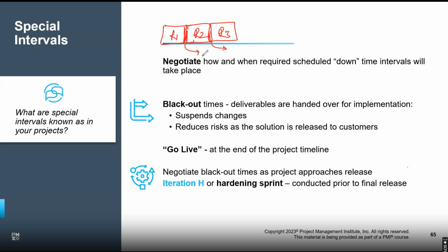These have certain names, so just keep that in mind. The word is blackout. Blackout is when you're doing the release and the handovers are done. When you do the handovers, these are referred to as blackout times. So you do the suspension. You do not do it on a live environment. Nobody does on live. You suspend all the changes which are going on, and active users will be notified that they can't use the application. For that period, you will be releasing this and testing whether it's working. I hope it's not behaving awkwardly. It's not gone wrong. Okay, perfect.